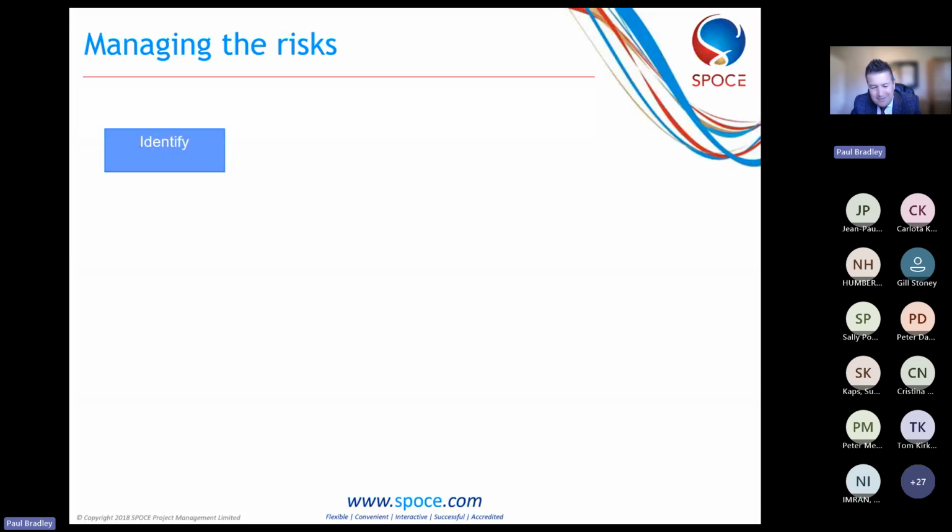Firstly, we identify risks. The way we identify risks is we might have workshops, we might have checklists and so on. And all these risks are going to be put onto a risk register.